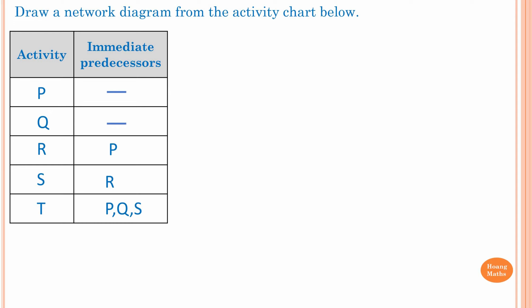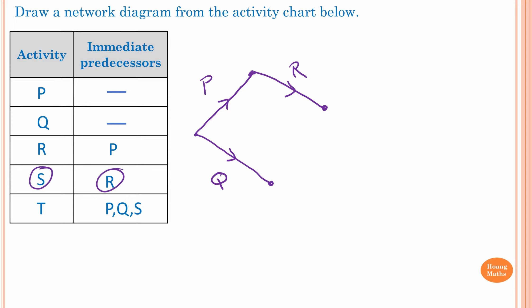We know P and Q have no immediate predecessor, so I draw these first — Activity P and Activity Q. R has an immediate predecessor of P, so I draw that next. This is R. And S has an immediate predecessor of R. Sometimes you have to draw a couple of times to get your diagram correct — it's not always right on the first try. Activity S requires R to be complete, but Activity T requires S, Q, and P to all be complete first. So Activity P, Q, and S must be connected together. We draw Activity S joined with Q.